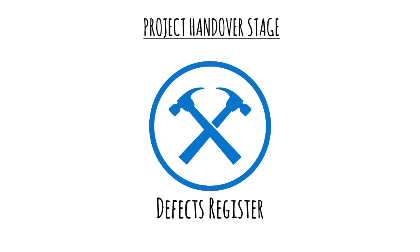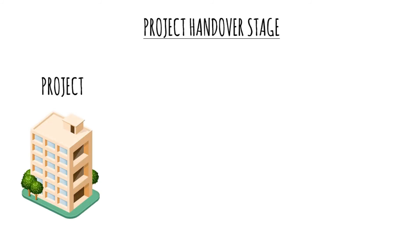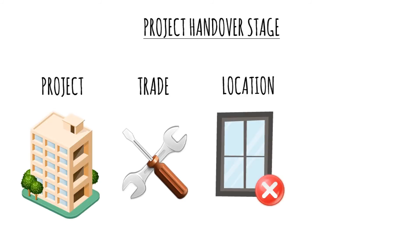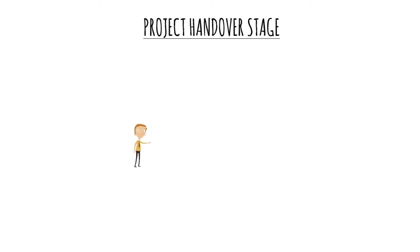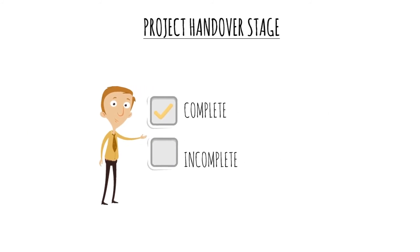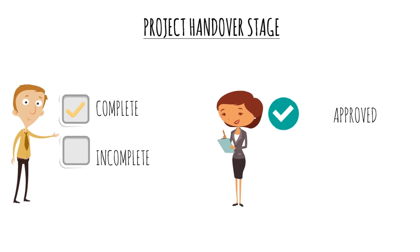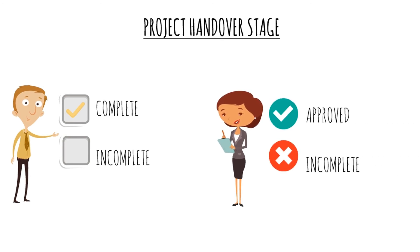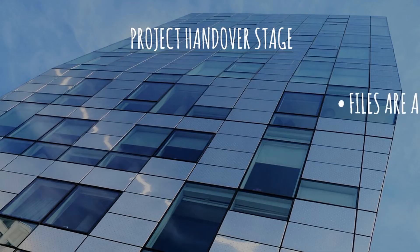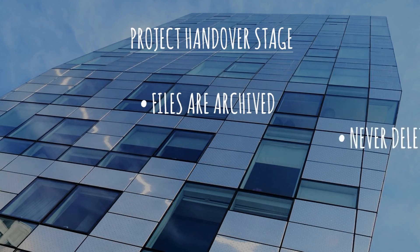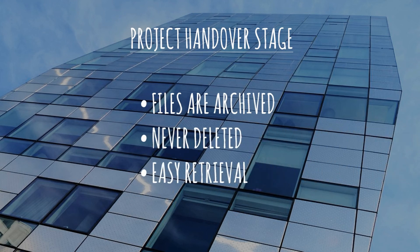The Build Tools defects register logs defects according to project, trade, location, and cost. Complete or incomplete status is easily entered by the subcontractor at fault, to be monitored and approved by the builder. Once the project is completed and handed over, rest assured that all files are archived — not deleted — for easy future retrieval.